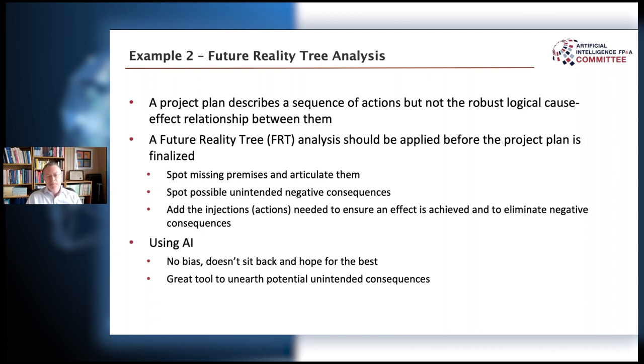And this is why, based on my experience, I've come to the conclusion that we should always do a future reality tree analysis before we set up a project plan, or even just to set up a project plan and then to analyze it logically before we embark on the project, because this tool is something we use to identify any missing premises, any unintended consequences that we might not see, and what is going to actually lead from the actions that we take.